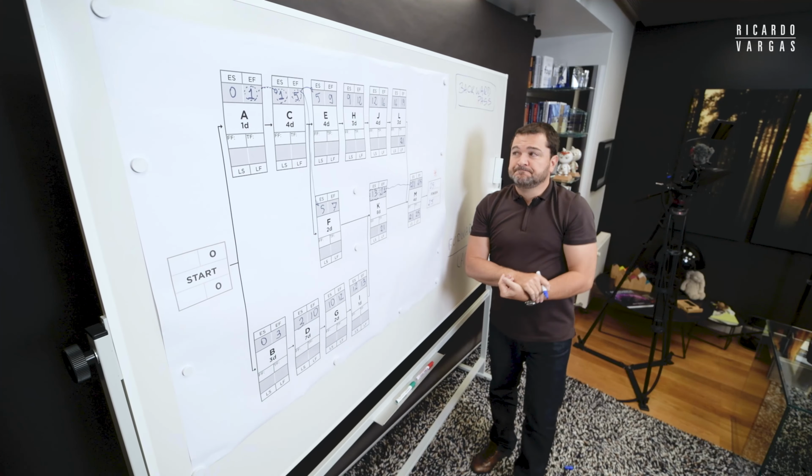Now let's do the very final step. You have two options to come to the start here. One is 2, that can come here. The other one is 0, that can come here. Which is the smallest one? 0 or 2? It's 0. And I need to tell you, every time you leave from zero here, you go and you come back and reach zero, you did it right because you closed the loop of the process of the forward and the backward. So what you just did, you just calculated the critical path.